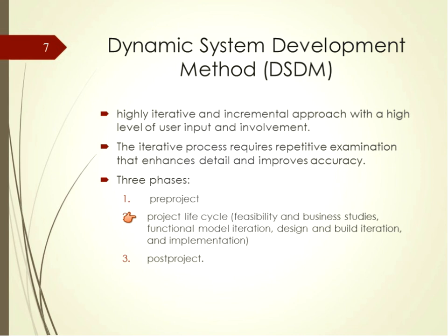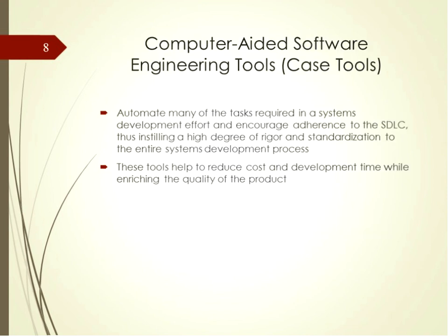Once the project is deemed feasible, step 2, the business study, begins. The business study extends the feasibility report by examining the processes, stakeholders, and their needs. It is important to align the stakeholders with the project and secure their buy-in because it is necessary to have user input and involvement throughout the entire DSDM process. Therefore, bringing them in at the beginning of the project is imperative.